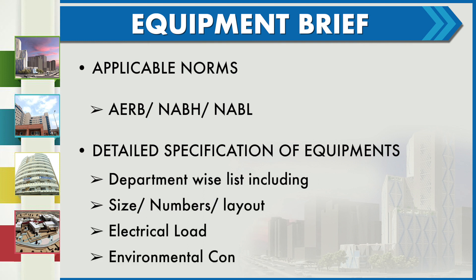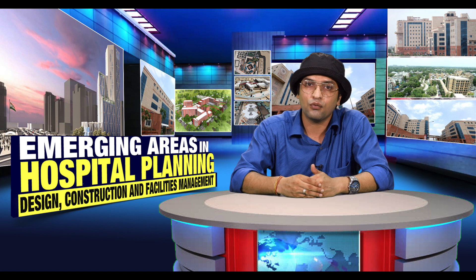The equipment brief will include applicable norms such as AERB (Atomic Energy Regulatory Board), NABH (National Accreditation Board for Hospitals), and any other norms to be followed. It will also contain detailed specifications of equipment to be procured, including department-wise lists with sizes, numbers, layout, electrical load requirements, and environmental conditions required such as temperature and room conditions for each piece of equipment.